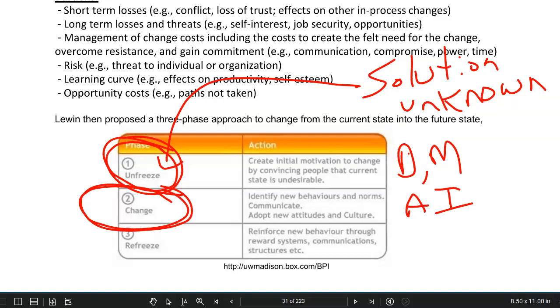And then the messaging changes after the solutions have been implemented and been measured and have been shown to create the improvement that we're looking for. In the third part of the benefits versus burdens communication plan, we work on statements around refreezing. The solution has now been implemented. It's been measured in future state. We've shown that performance gains occur. This is typically done in the control phase.